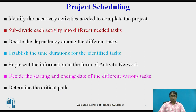Software project scheduling is an important project planning activity under the supervision of a project manager. To schedule a project, a manager needs to: identify the necessary activities needed to complete the project; subdivide each activity into different needed tasks; decide the dependency among different tasks; establish the time duration for identified tasks; represent the information in the form of an activity network; decide the starting and ending dates of various tasks; and determine the critical path, which represents the duration of the project.